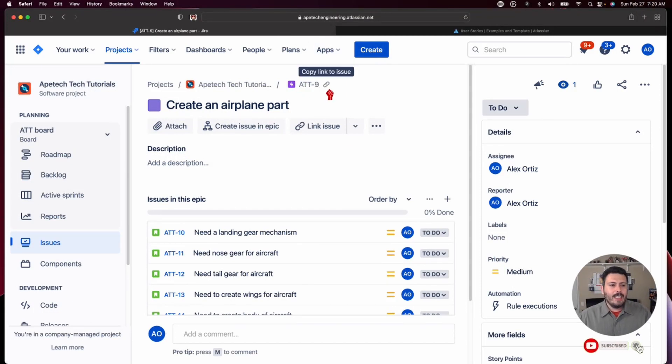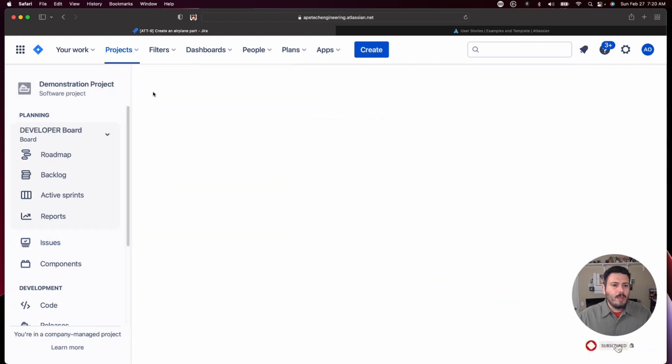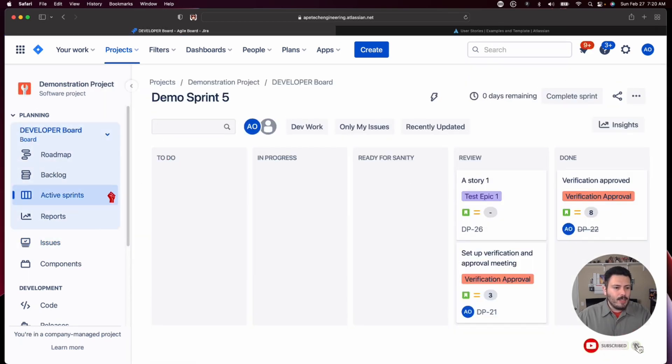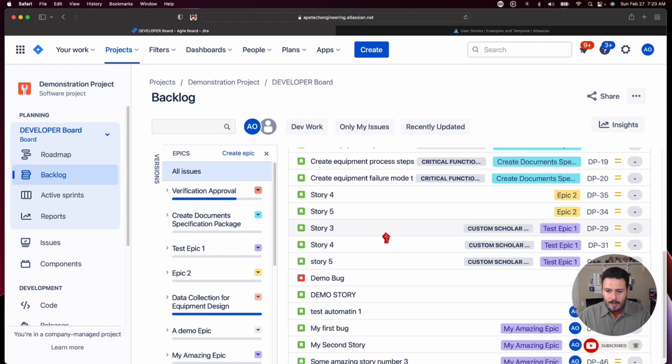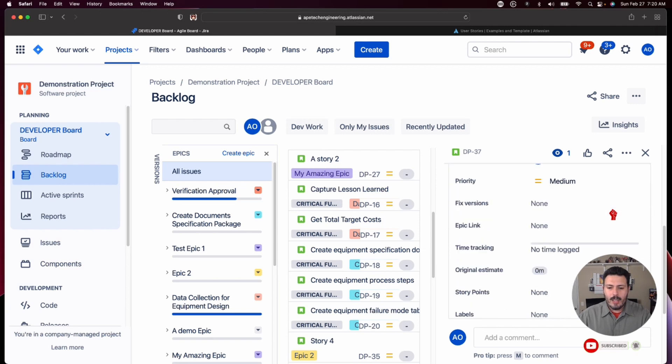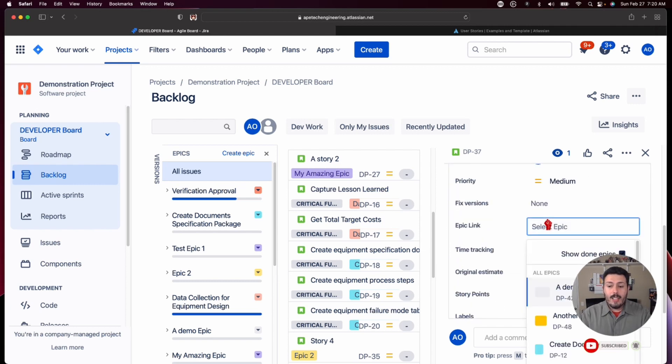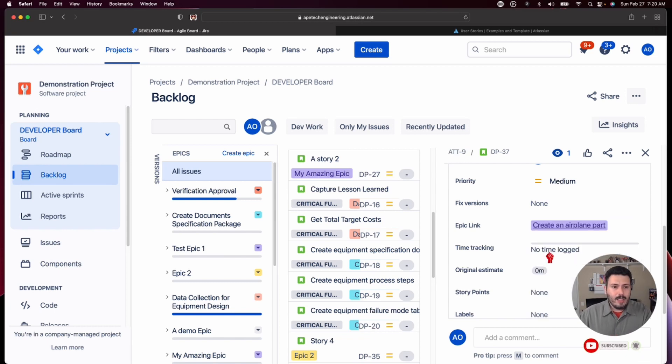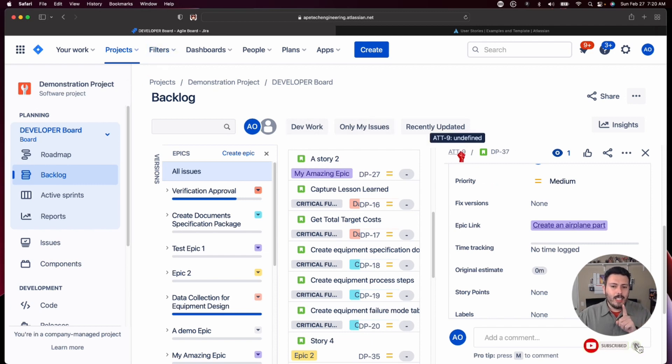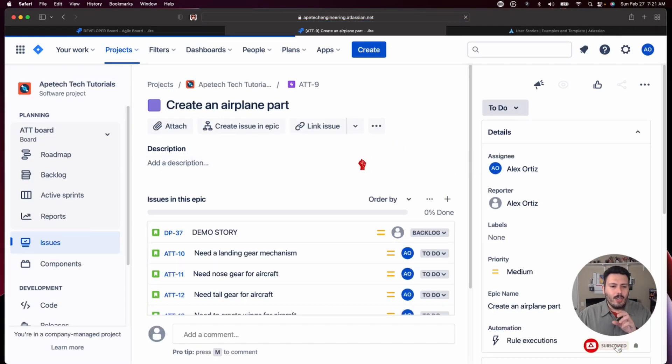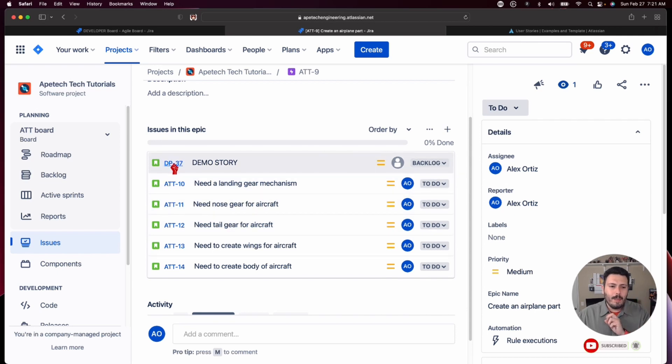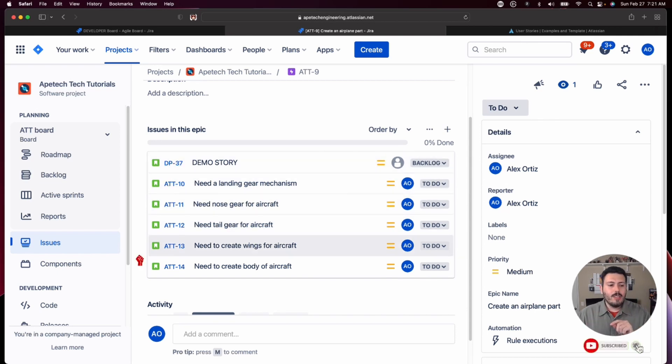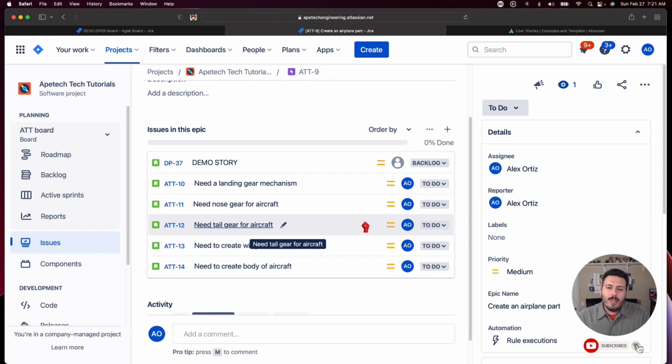Again, so I'm going to have ATT 9 and I'm just going to jump into another project. I'm going to go into this demo project here. I'm going to have a story. I'm just going to pick one of these stories that I have. This one right here doesn't have an epic associated to it. I'm going to come down to the epic link and I'm going to type in ATT-9 and you'll notice that it found it even though I'm in the DP project demonstration project. But now when I go to ATT 9 by clicking here and I'm going to just click on it so it makes it big. You'll notice that I have most of my stories on the ATT project, but I do have that one DP project. So this is allowed and you can do this, but only if you're in a company managed project. So if you're in a team managed, you're out of luck there. Your stories have to be contained.